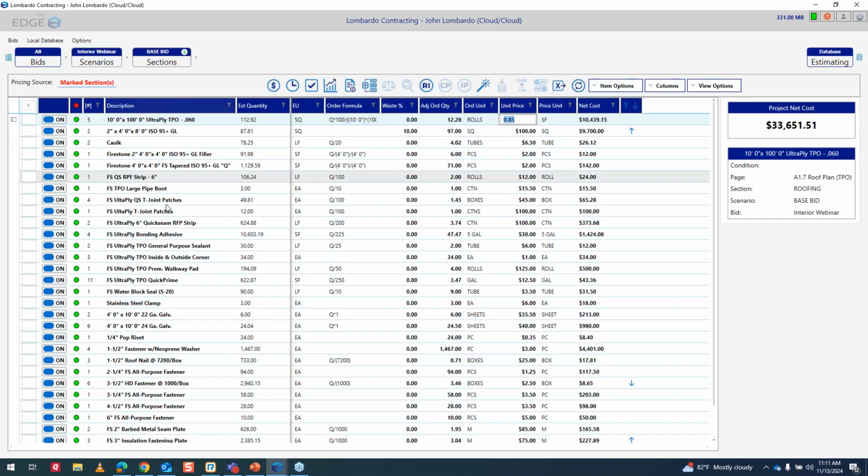And in the material screen, it gives you all the values that you need to look at to review the bid. So here I'm looking at my descriptions of all my products that I use for my wall flashing, my curbs, my roof area, and etc. My roof drains, coping, gravel stop, drip edge, gutters, and downspouts. And it breaks down all the products. It gives you what your estimated quantities are, how you estimated it in the edge by squares, linear foot, etc. And then how are we converting these items on the left to how you order it?